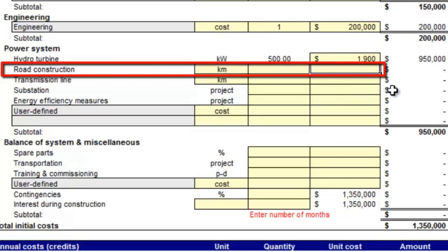An access road for construction and ongoing service road are normally required for medium to large scale power projects. These requirements will depend on the site selection and the nature of the terrain. There might be seasonal limitations for both construction activity and for use of roads to transport equipment. At some project sites, there may be no need for road construction, even if the site selected is not located on existing routes. However, the location of the existing roads should be a consideration during site selection.